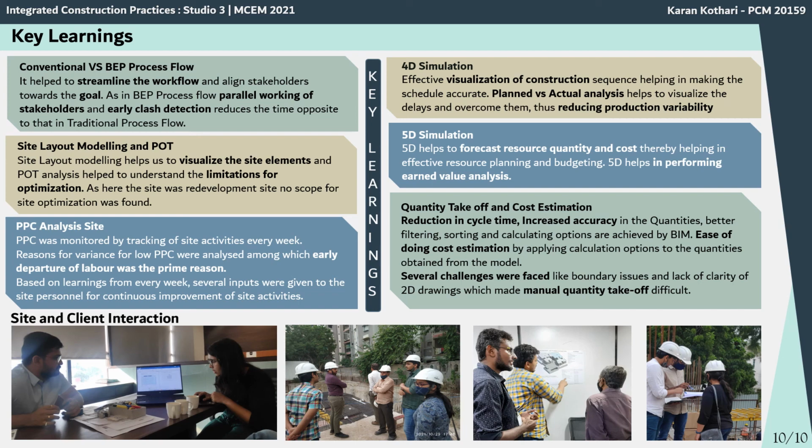The 5D simulation helps to forecast resource quantity and cost, and it also helps in performing earned value analysis. The quantity takeoff and cost estimation resulted in a reduction in cycle time, increased accuracy, and ease of doing cost estimation by applying calculations. Several challenges were faced, like boundary issues and lack of clarity in 2D drawings, which made manual quantity takeoff difficult.